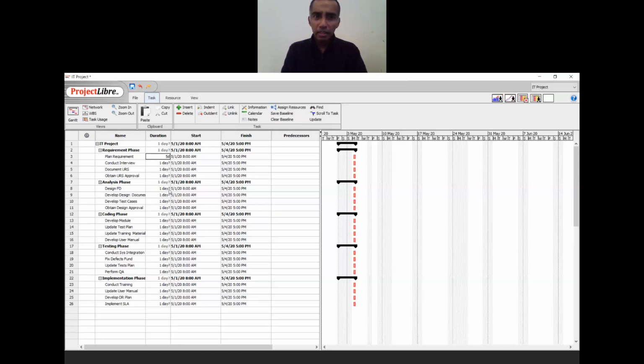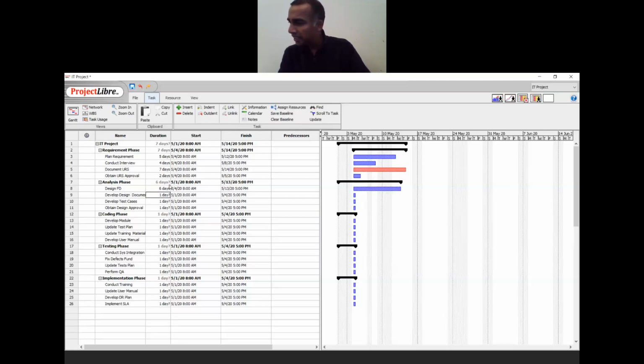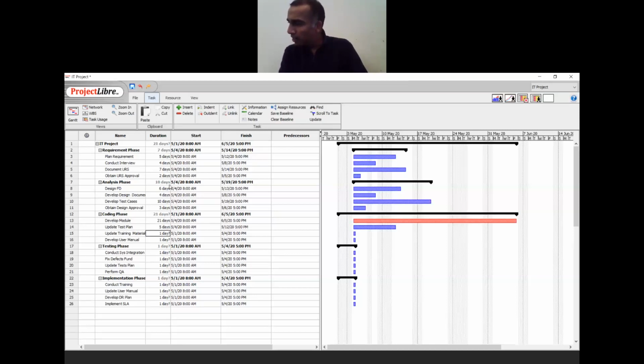In my case, I want to put 5 days. Next one is 4 days. Next one is 7 days, 2 days, right? Just for data entry purposes, I use this dummy data: 6, 4, 10, and 3. And the next one is 21, 5, 6, 4. You can see some red color things are being formed there. The rest are all blue. Red color means this particular thing is the longest part, so this is the critical part at the moment.